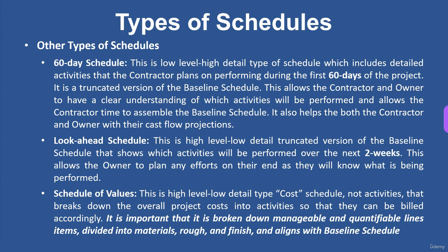So what that does is, and I'll give you an example in a minute, I usually use it in a spreadsheet, kind of lay things out. We're going to do this on this day and this on that day. And you can do it in week. I usually do 2-3 weeks at a time, and it's easier to follow than a baseline schedule because sometimes things jump around a lot, and you could have a 20-page schedule. This is more of a one-page document.